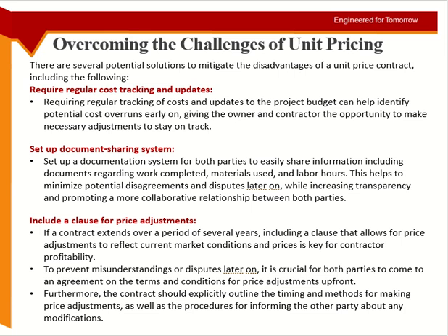So the very important part here is that in the terms and conditions, you mention when the change will happen, how will we deal with it, who will submit what to whom. It's not like the contractor calls you, oh, I want to increase the unit price by 3 BD per unit. No, there's a process.